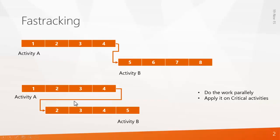First we will see the concept behind fast tracking. Consider activity A and B — activity B starts after completion of activity A, making the total project duration 8 days. If management asks you to reduce this to 5 days, you have no choice but to do the work in parallel. Doing work in parallel is called fast tracking, and it must be applied on critical activities.